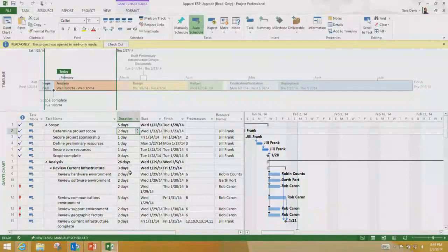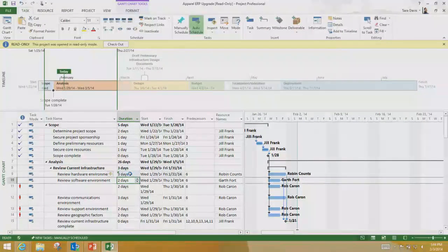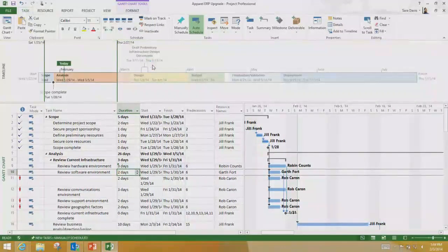Actually, let's do a task that's not completed. And then I'm like, oh, I'm read-only. I click checkout, and my edits are kept, and I now have the file checked out, and I can keep going. The only time that won't work is say I open it read-only, and he has it checked out and is making updates, and then when I click checkout, even if he's checked it back in, it will have to reload it because I don't have the latest data. But assuming I have the latest version, it will just seamlessly switch from read-only to read-write mode.